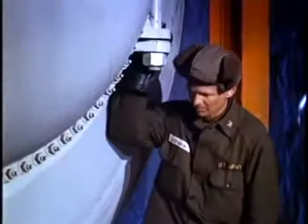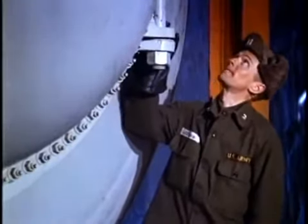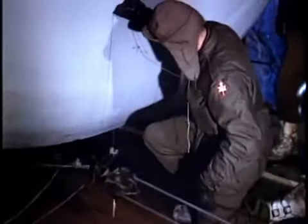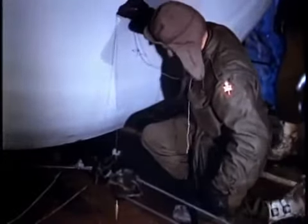We had to use hand rigging methods, the best we could do under the confined conditions, to put the nuclear equipment in place. Every step had to be checked very carefully, since the power plant had been pre-fitted in the United States and must be emplaced within a tolerance of 1/8 of an inch.